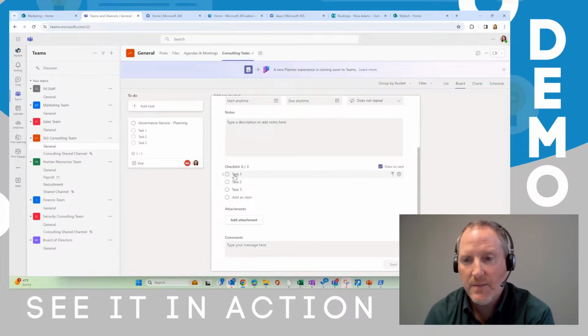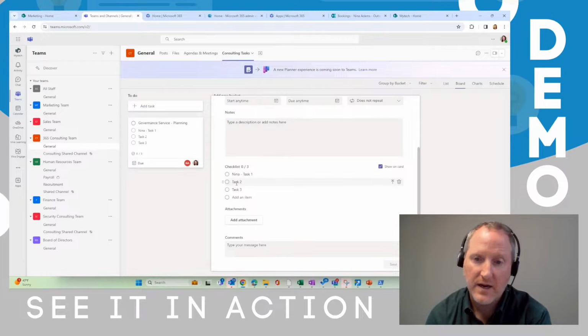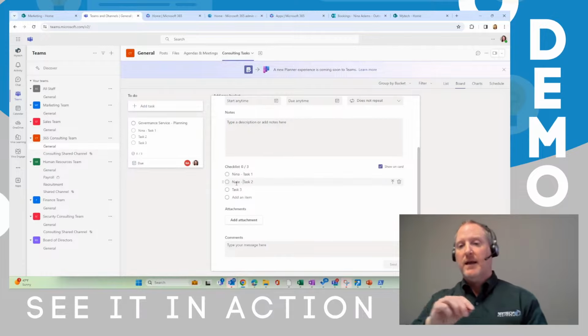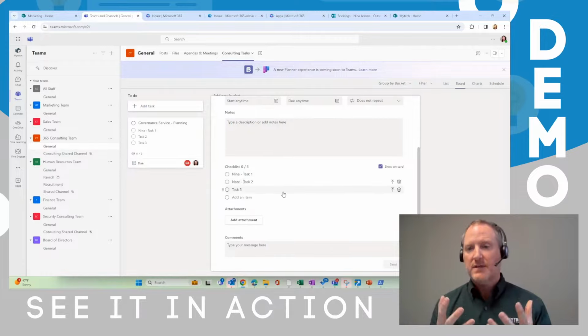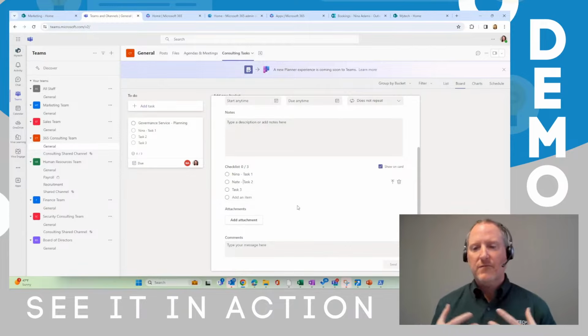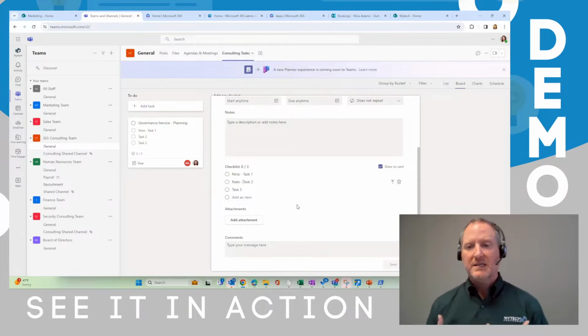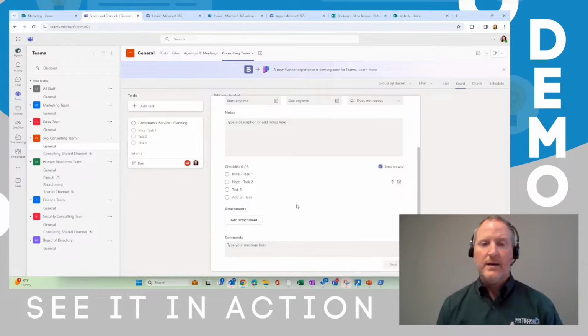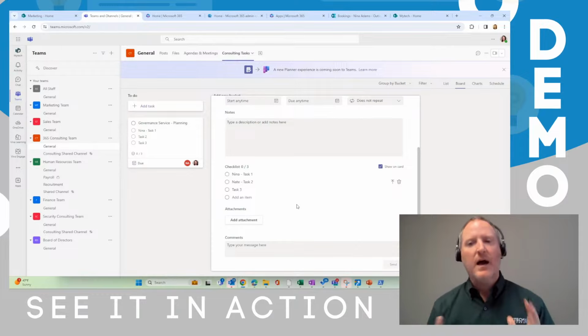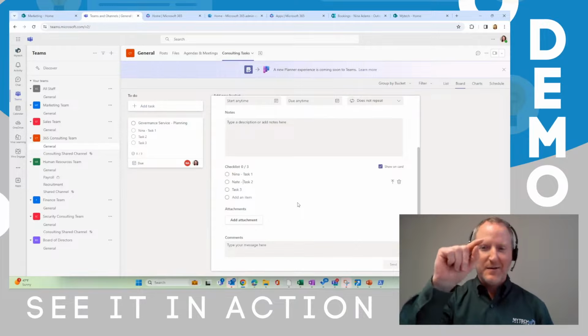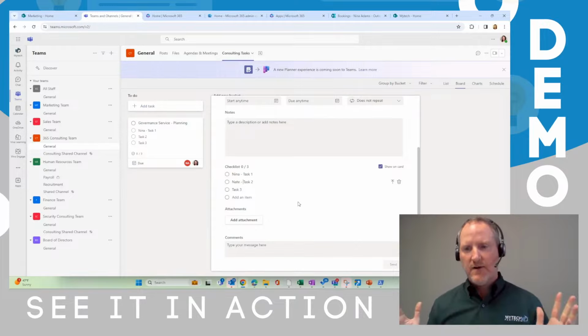So that could be one of the ways to be more clear. It also could be if you had a methodology as part of your organization. So when Nina completes her task, she could go down to the comments and say, hey, I've completed mine, and that time and date stamps it and captures it. So there are different ways in which you can manage that if you really feel like multiple people being assigned to a task is critical. But again, just be conscious of that, because unless your team really knows what they're doing and is familiar with this stuff, they're highly likely going to click complete when they're done, and then it completes it for everybody, and that's not really what your intent is.